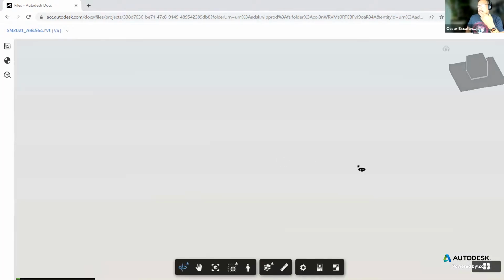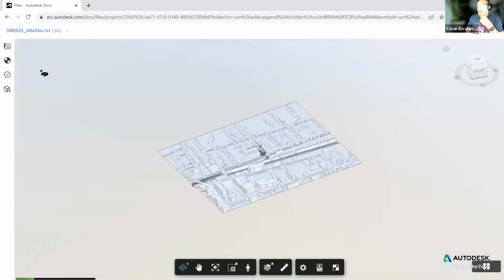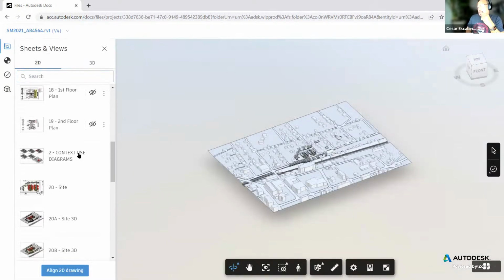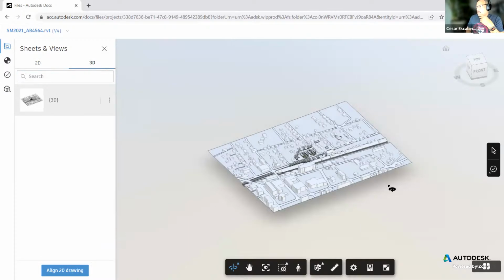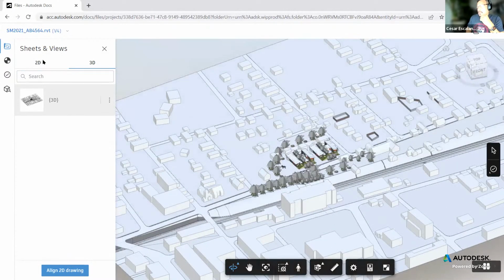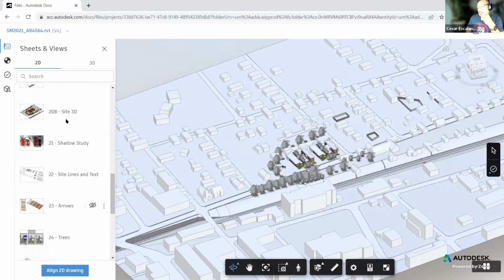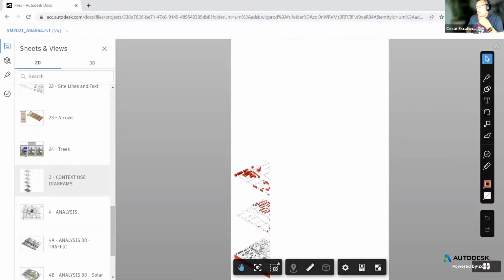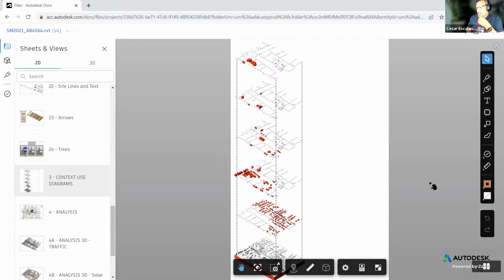All right. So these are the markup tools for two-dimensional sheets. Notice that in 3D, you cannot do markups. You can only do them in projection views. So any of these flat two-dimensional objects will display these markup tools.